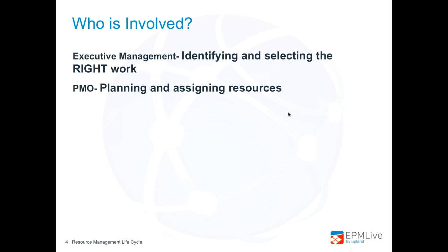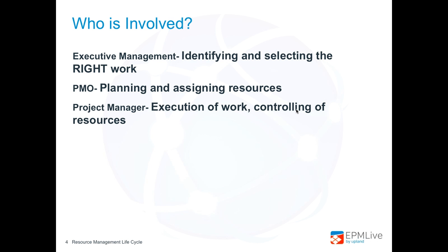In many organizations, the PMO will be in charge of inputting resource data into the resource management tool, whatever tool you're using today. The PMO will play a key role in the first 2 steps in the resource management lifecycle, including planning resource roles and then identifying which resources will fill them. So again, within each organization, it may vary at what point the PMO or the project team gets involved.